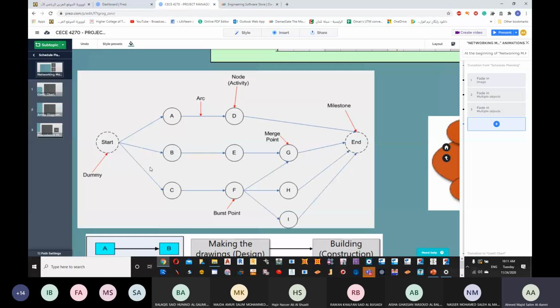Based on the calculation, you will know which tasks have zero gap or zero flexibility, and these are going to be your critical tasks. If you add the critical tasks which are coming in the same line, you will find your critical path. Okay, and once again, the path is the distance from the start to the end. The path is the period, or let's say the journey from the start to the end of the project.